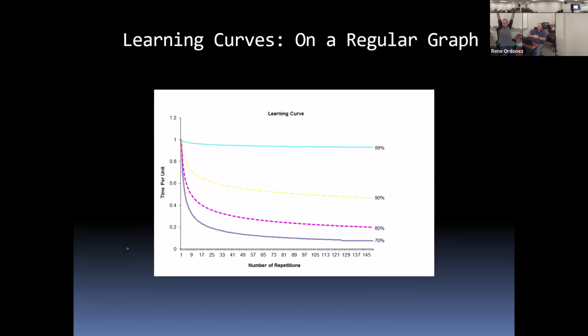Okay, now I want to replicate a learning curve like this that will also be dynamic. Note here that as far as the learning curve theory goes, the higher the learning rate is, the less learning occurs per repetition. So remember that the learning rate is the complement of the learning that's going on. When you have a learning rate of 99%, that means there's really not much improvement, no matter how many times you perform that particular task. Not forever, but not much improvement.